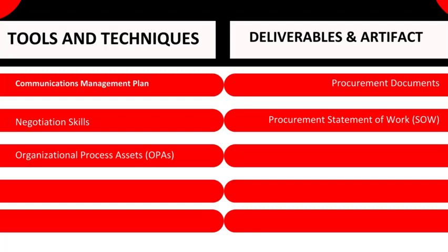The SOW includes the following information: the name and version of the software development tool, the features that the software development tool must have, the number of licenses that the team needs, the budget for the software development tool license, the deadline for purchasing the software development tool license.